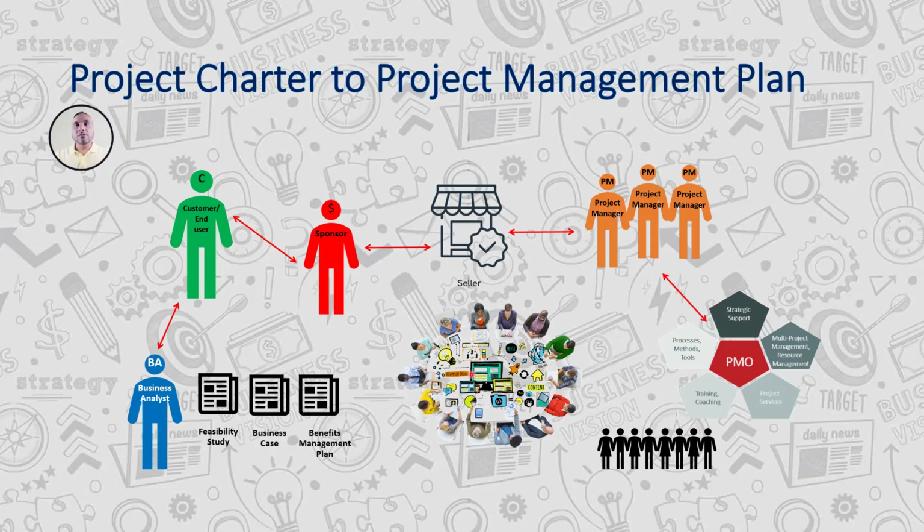And for any changes after the approval of the project management plan, it can only be done with the help of a change request. For a change request, we need to establish a change control system, which contains the artifacts and the tracking methods. Artifacts like the change request form, the governance structure defined, the change management plan, how the changes will happen, and the configuration management plan, that is how the product configuration will be changed.